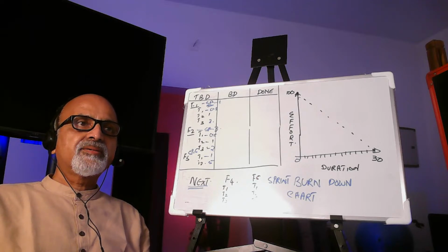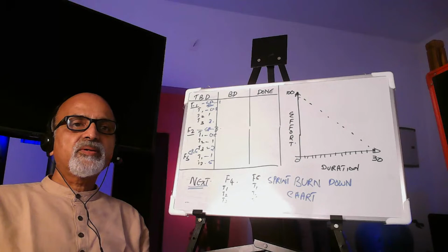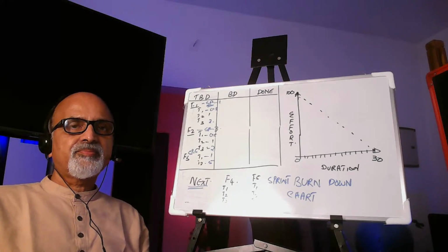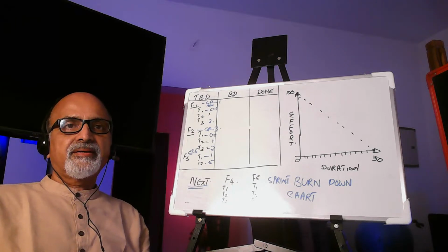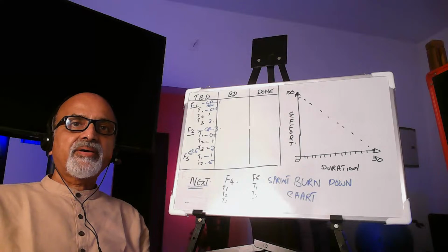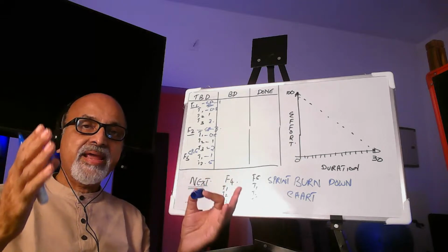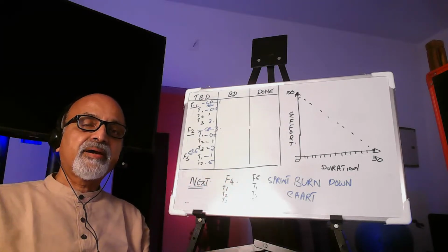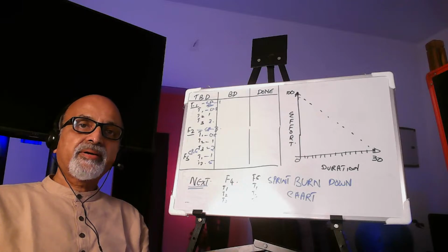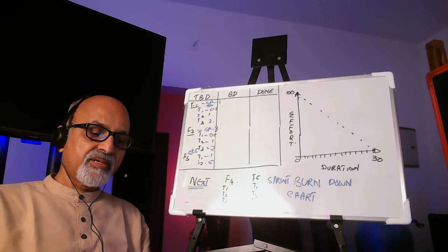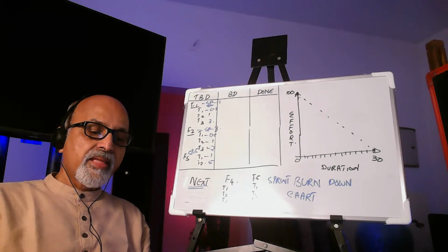Release burn downs are used by senior stakeholders to see the progress of the product against a particular release. Then we have the product burn down chart, to see the overall picture of the progress we made against the final delivery of the product or against the product roadmap.